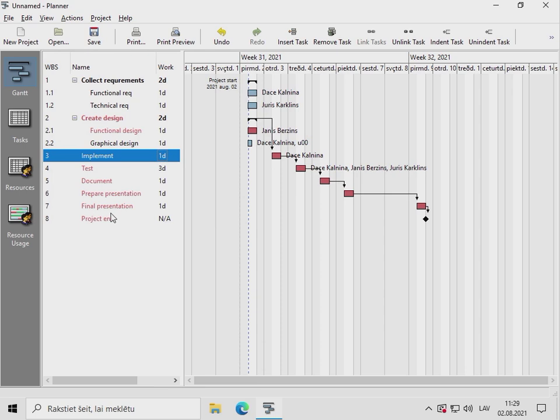For example, in real construction and real engineering, you need to wait while your concrete hardens, while paint dries, etc. So adding more persons to this task will not make it shorter.